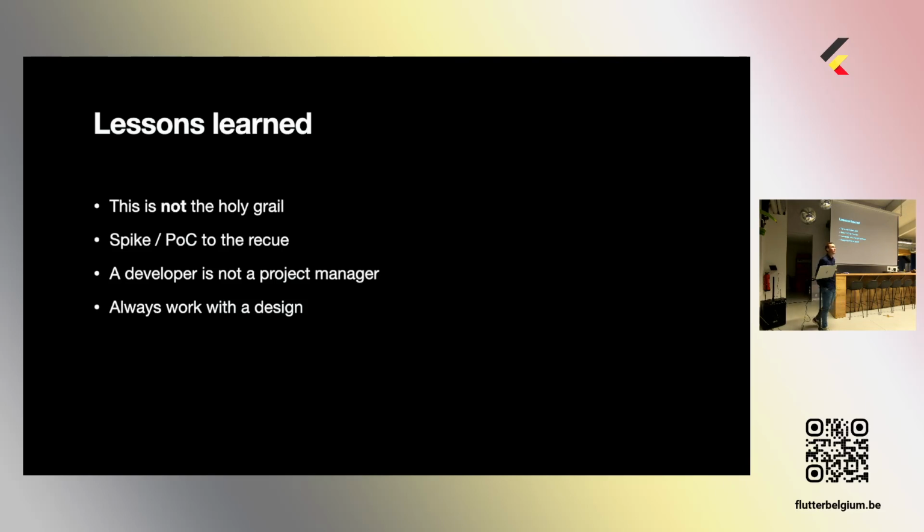And try not to focus on one platform at a time, because we had a proof of concept a couple of months ago building a CarPlay application, and we only did it on iOS, and eventually on Android it was a mess and we fully went out of budget. So that might be an extra key to keep in mind.